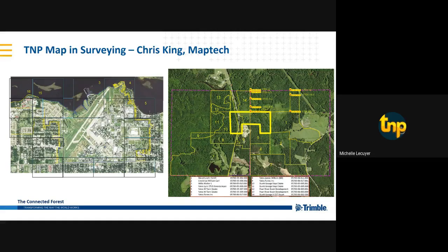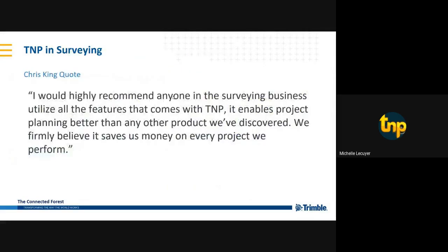And here you'll see a couple of maps that he generated in TerrainNavigator Pro. Each of these TMP maps was prepared prior to sending the survey teams to the project sites to perform those boundary surveys. They were prepared so that the crews would have a better idea of where to look for property corners, etc. They were also used in the negotiation of fees to perform the boundary surveys, giving better evidence of the true amount of work the field crew would have to perform. So, great desktop slides from Chris.